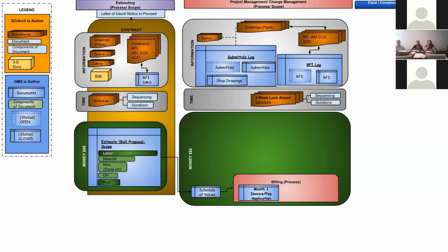There may be a labor rate increase or also a material increase that we wouldn't have incurred if we would have built when we said we were going to build. But because we've built after when we said we were going to build, there's additional costs occurring due to this schedule slide. So that is, on a high level, where project managers can look at that and see how this information and how the time component can affect our billing. It can affect how we're going to price, and can affect manpower allocation in the delivery of the project.